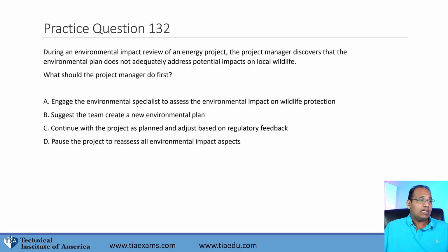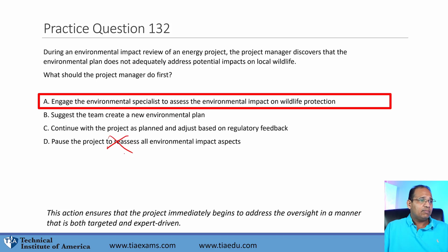Well, before you stop the project to create a new plan, if you feel like there's something going on, meet with the right specialists, meet with the right people on the team to see, okay, I've got a hunch this is not going to work or this can potentially impact. Don't stop the project for something that's only potential. Ensure that this potential is 100% correct or you have good information before making that decision. So the first thing you should do is make that assessment, and never do nothing. Don't just continue to plan and wait for some kind of regulatory feedback. Never do nothing. Always assess the situation.